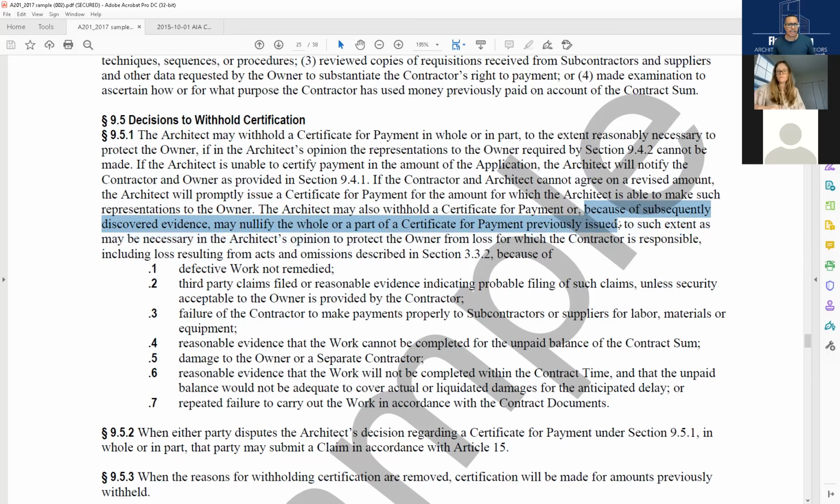In this case, let's say I'm saying to Mr. Owner, change order number 1, we are leveling the concrete floor. We actually installed the whole flooring and never leveled the concrete floor. And we put the finished floor on top of that, and it's wiggly. Well, on the next application for payment, we're going to deduct that amount and say, no, you didn't complete that. You could actually nullify that previous payment, but you're going to reflect it on the next one, I would say.